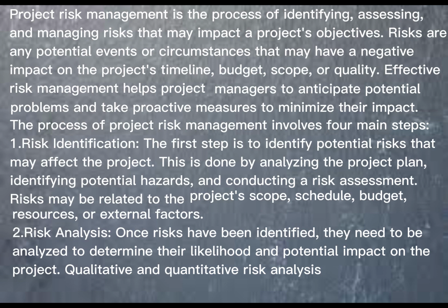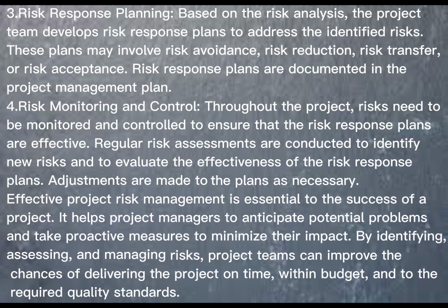2. Risk analysis. Once risks have been identified, they need to be analyzed to determine their likelihood and potential impact on the project. Qualitative and quantitative risk analysis techniques may be used to prioritize risks and develop risk mitigation strategies. 3. Risk response planning. Based on the risk analysis, the project team develops risk response plans to address the identified risks. These plans may involve risk avoidance, risk reduction, risk transfer, or risk acceptance. Risk response plans are documented in the project management plan.